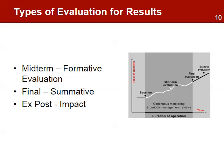In RBM, there are usually three types of evaluations: the mid-term evaluations, also known as formative evaluations; the final or summative evaluations; and the ex-post or impact evaluations.